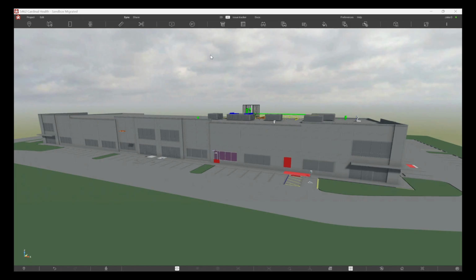And these Monday meetings have actually begun to shift now to cover the clean room and the drywall. That's just as we move forward in construction, that's the stuff we're leading into, and even some drawing changes, like expanding the clean room location. That's just resulting in more coordination. So shifting these meetings to whatever the quote unquote hot topic is definitely helps streamline the process as a whole.